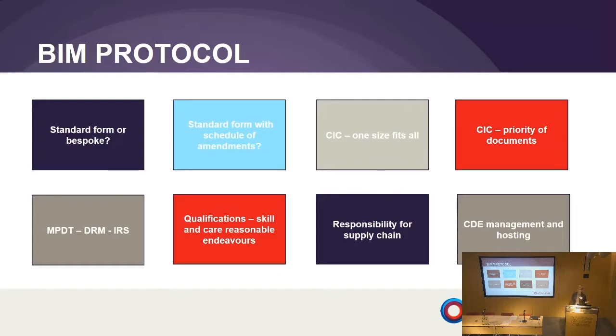And they work equally as well, but they're all very different, but maybe they need to be at the moment as we're still finding our feet and everybody's models are very different and everybody's requirements are very different. One of the reasons I think clients might be shying away from the CIC protocol is it is one size fits all. So it has to work with JCT language, it has to work with NEC language, it has to work with FIDIC language, it has to work with anything else, and it has to be incorporated in. So that kind of takes a little bit of amendment each time to make sure it fits with how the contracts work and how the contract terminology works.